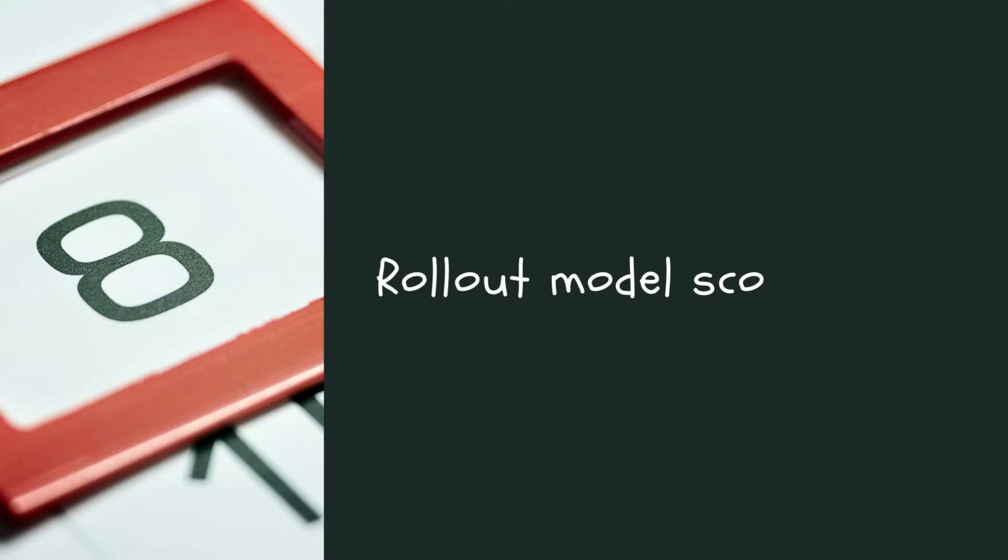If you're planning a phased rollout model, it's critical that the approach is clearly documented. What are the phases? Which business processes are included with each phase? What are the timelines of the phases? And so on are the types of questions your scope should document and answer.